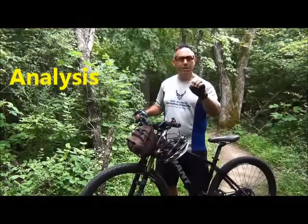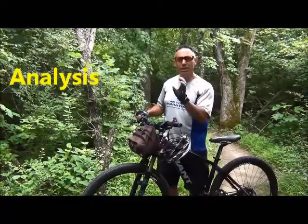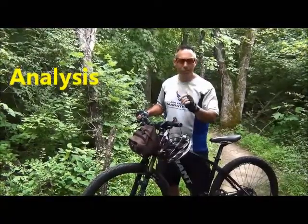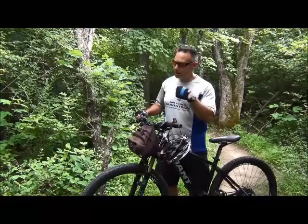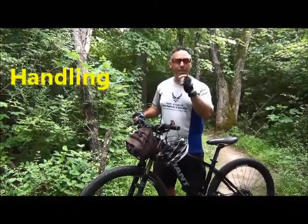And that's why I started looking at analysis. Analysis is looking at what's the likelihood and what's the consequence of any given risk that you've identified. So the likelihood, pretty high. The consequence, I may have a long walk to go. So the fourth step is how am I going to handle that?